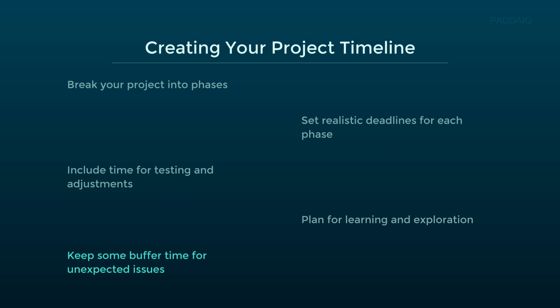Keep some buffer time for unexpected issues. This means planning extra time in your schedule for surprises that could cause delays. For example, if a team member gets sick, your buffer allows the project to stay on track without rushing. This simple step ensures your timeline remains realistic and manageable, reducing stress for everyone involved.